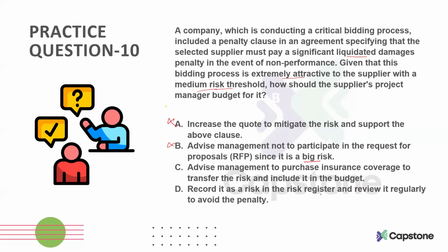Recording it as a risk in the risk register and reviewing it regularly to avoid penalty is not going to solve your problems. Because if you are going into the delivery and you are accepting it, just recording it in the risk register and reviewing it regularly is not going to lead you anywhere unless you have a strategy or a plan for how you will be dealing with this type of risk. So in this scenario, even if you use the elimination technique, you would have reached the right answer.